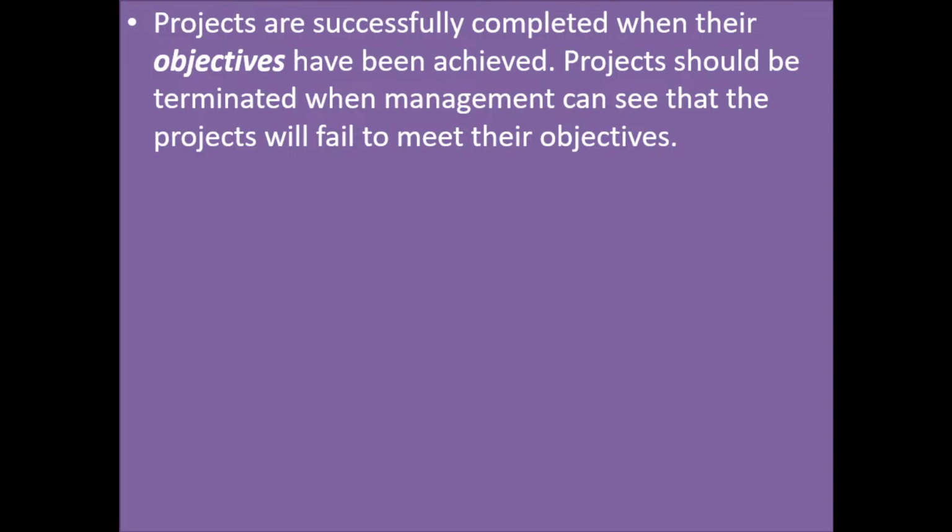The young man that designed the project says 2-story building. You that handle the structure say 4. You project managers should know all about the project. So what happened? His excuse was that, yes, the church initially came up with a plan of a 2-story building because there was no money. By the time we got to the first floor, there was too much money and we decided to increase it to 4.